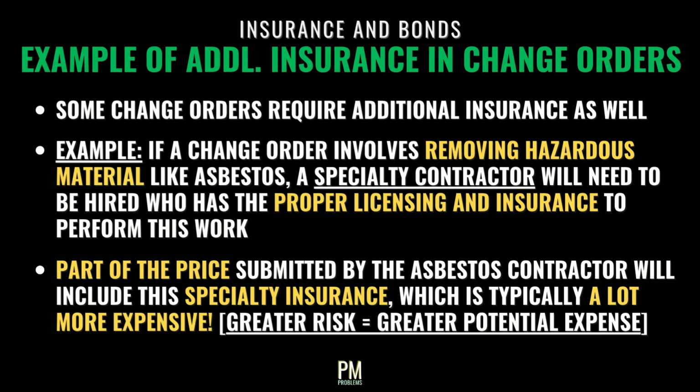This means that part of the price submitted by the asbestos contractor will include the specialty insurance, which was not included in the project before and is typically a lot more expensive than traditional construction insurance due to the greater risk involved.